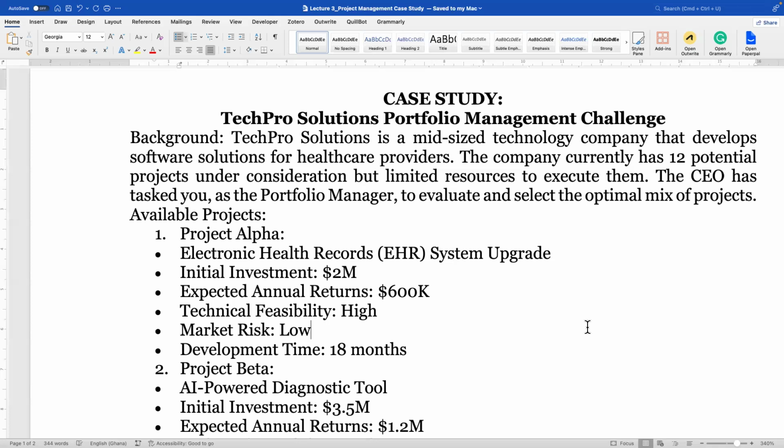When you do that, the answer you get is in what? Is it in cities? Is it in years? Yeah, it's a payback, so it's in years. It's always attached to years. So assuming you get 0.5, that's half a year, 6 months. So it means we have to calculate the payback period for each project. You see? Are you listening?